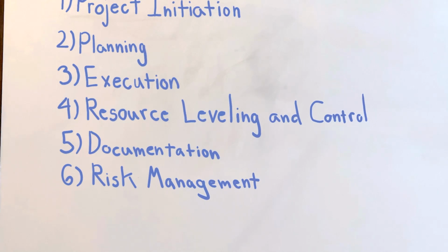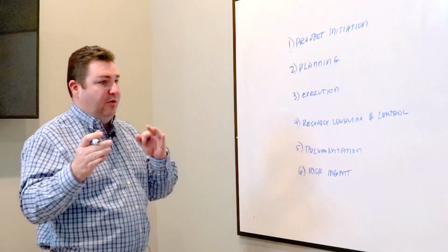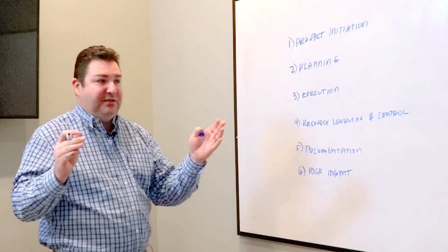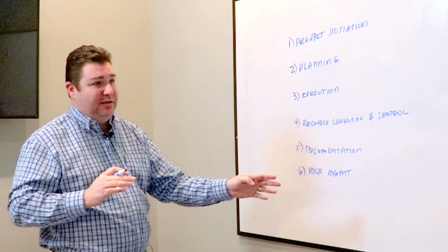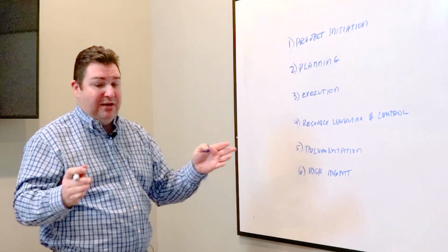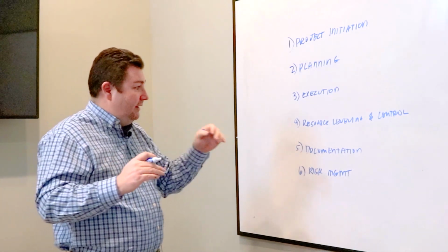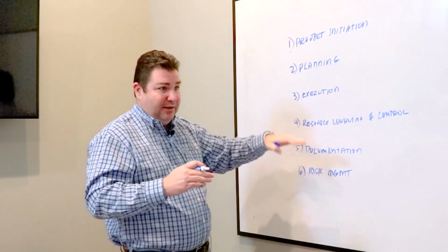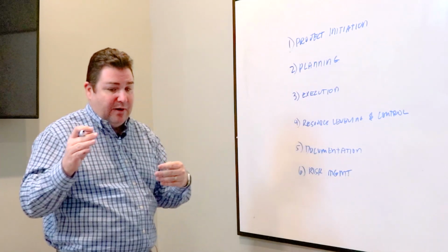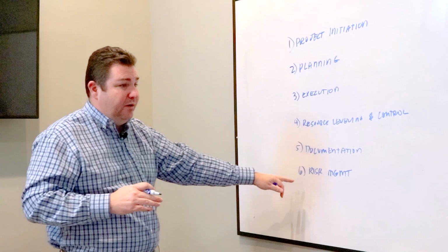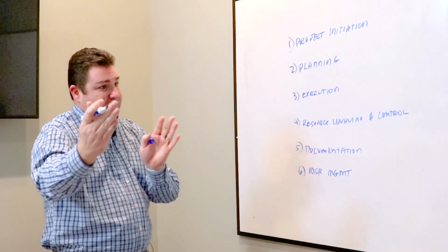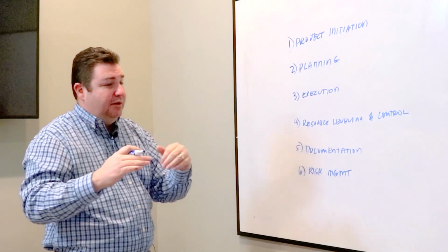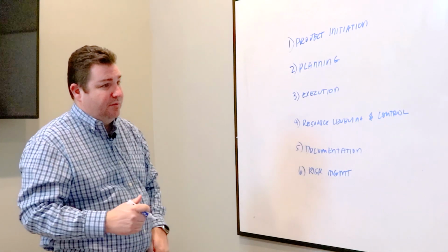So this is where we're putting that analytical hat on and we're going, okay, of all of these tasks that may be running slightly behind, what risk do they represent to the overall success of the project? And then how do I manage that? So does that mean that I am bringing in the resourcing and leveling portion of it? Am I going out and adjusting the plan accordingly? Do I say, I was on the 4-week side, now I need to go to the 6-week side and make sure I set expectations in week number 2 so that we're not an overall disappointment in the delivery.